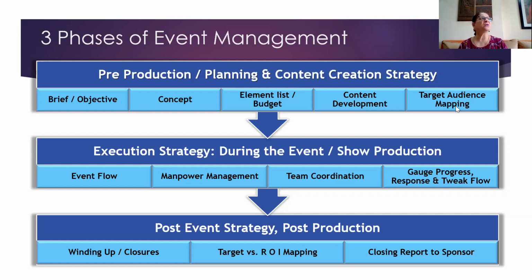Normally this is about another 8-10 day phase, sometimes even 15 days when it's a large event, when there are a lot of vendors and sometimes breakage. Bringing down big sets and large production takes about 4 to 5 days also. So depending on everything, this is how the post-production team takes over. Of course, they keep on going.